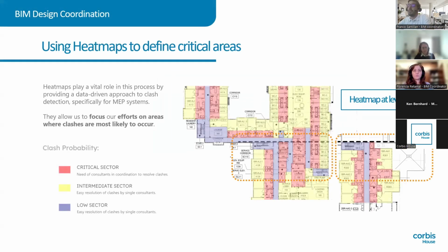Once we receive approval to apply this methodology in a real project, we need to receive all the possible information, such as the set of drawings, the 3D geometry models, and all the specs from the consultants involved in this project. A group of professionals analyzes and detects different critical zones to focus all our efforts in a specific zone where we consider it more important to pay attention than the other ones for the different